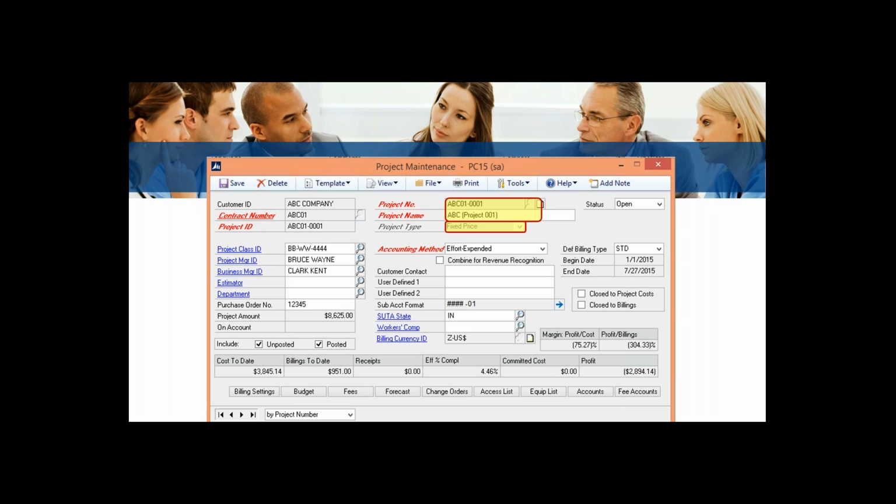I can have time and material projects where my revenue is based on a unit price. Typically, for time and materials, labor is a key unit that we would use, and so I would set maybe an hourly rate. Every unit of every hour, I would get to bill a certain amount.